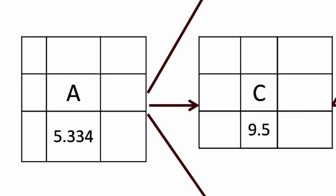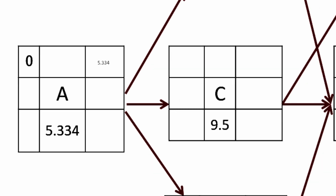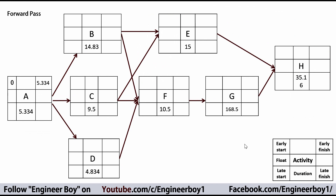Let's focus on activity A. The early start of activity A is zero, and adding the duration gives us the early finish, which is 5.334. Then we simply forward the early finish of activity A to the early start of each activity B, C, and D, because A is the predecessor for those three.